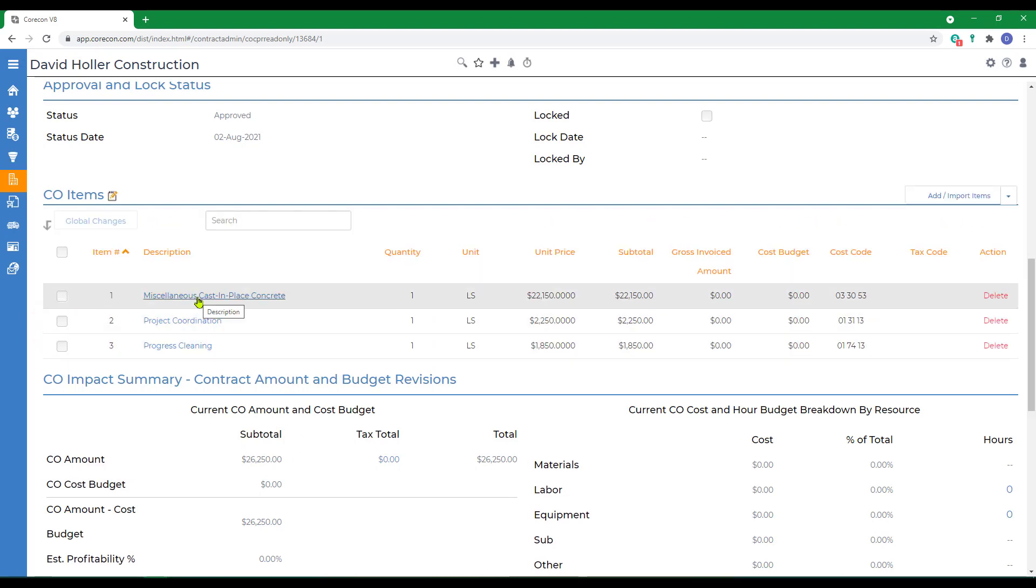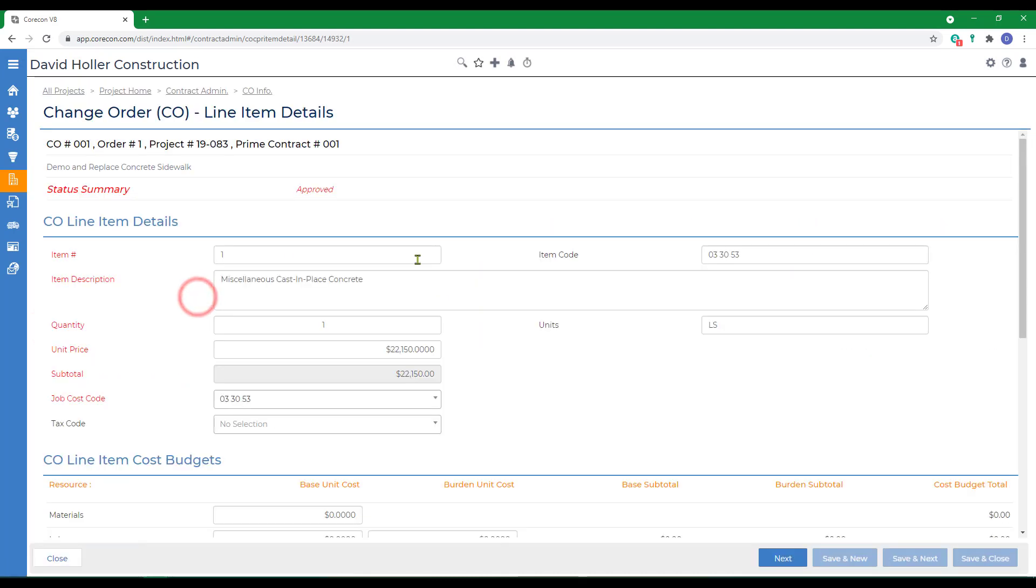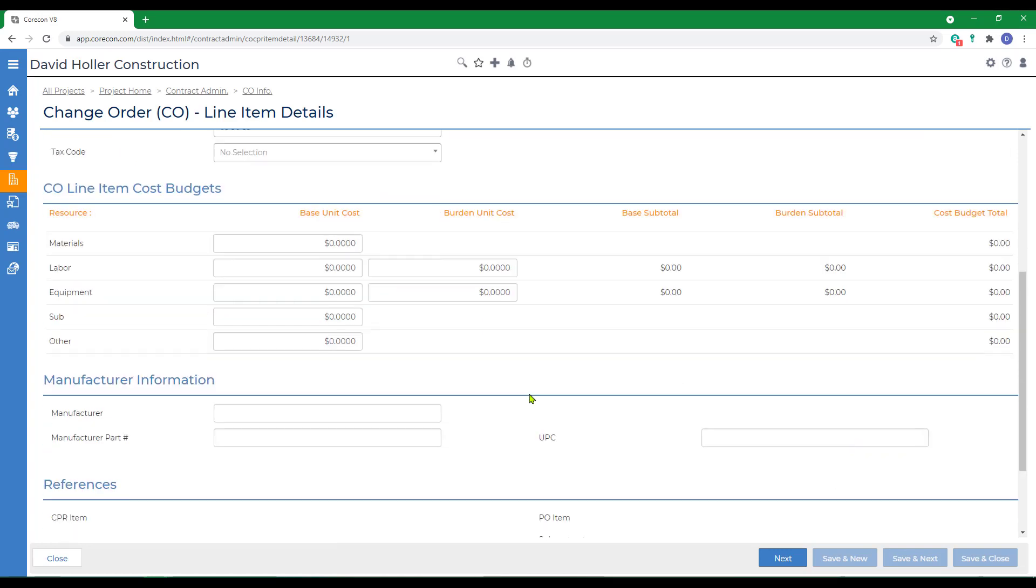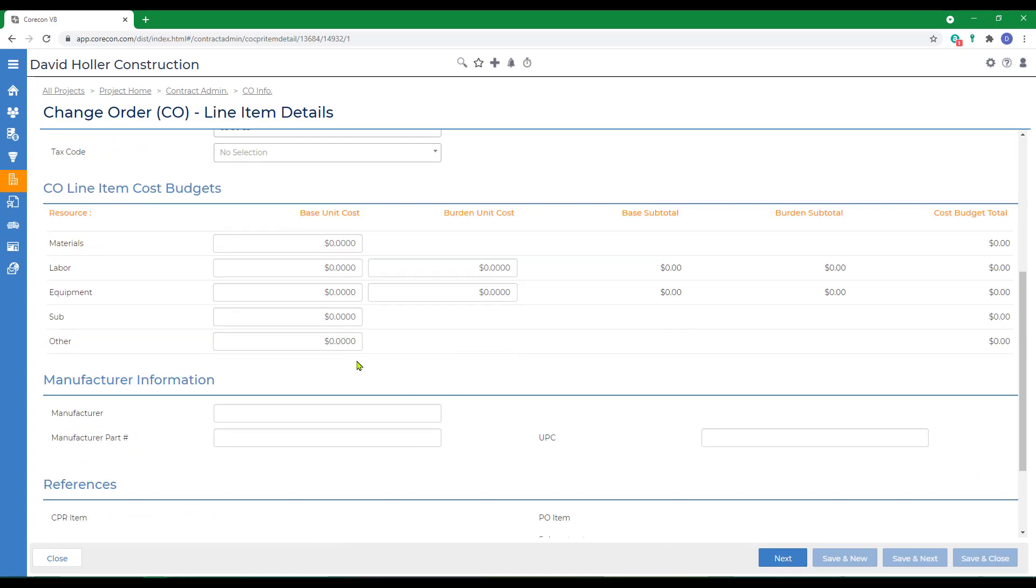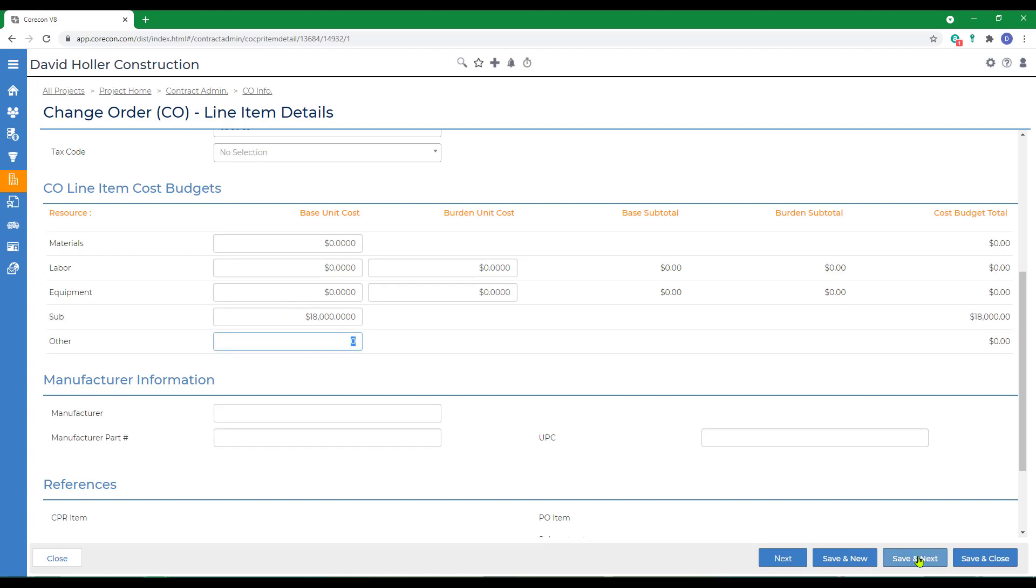I'm just going to click on the first item. You'll notice at the top that the unit price appears. If you scroll down to the second section, this is the cost budget. But this would be something less than the amount that shows under the price. So let's say we're going to pay the subcontractor $18,000 for that. And click Save and Next.